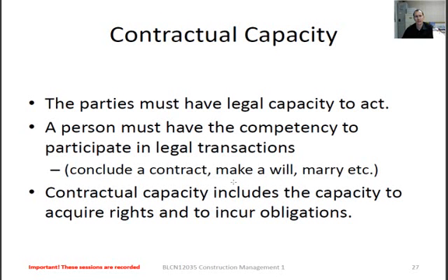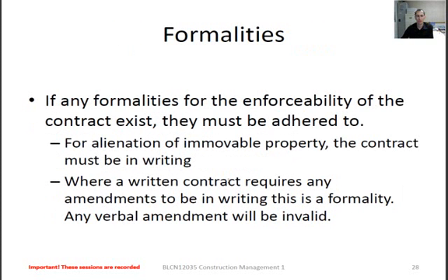You must be competent, you must have the correct authority, either by board resolution, whatever the conditions are for your specific employment or for your capacity to contract. So this one, Morgan, this is the one that we spoke about earlier on. If you are going to sign the contract on behalf of your company, you need a board resolution typically that allows you to sign the contract, and that board resolution will be specifically drafted for that specific contract.